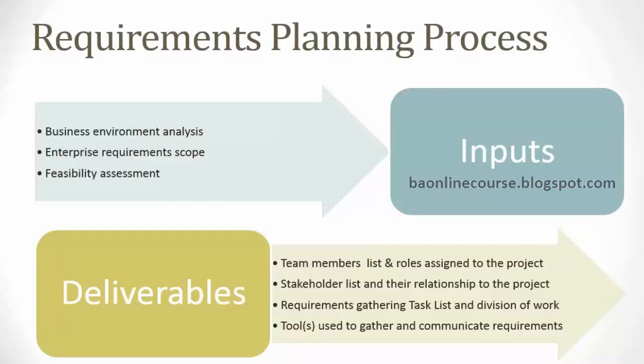You'll work towards that, and then you would have identified all the activities that you are going to do and the work breakdown structure as well. Right? So that is important. Based on the number of features or functionality that the system is offering, you'd come up with a detailed work breakdown structure and then the schedule as well. Then you'd also identify what tools you would use, right? Like for capturing the requirements, you could use a use case framework. For understanding the requirements, you could use a workshop and prototyping, right?